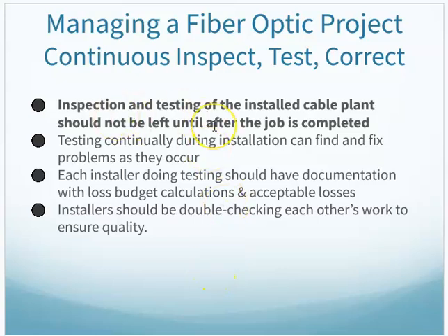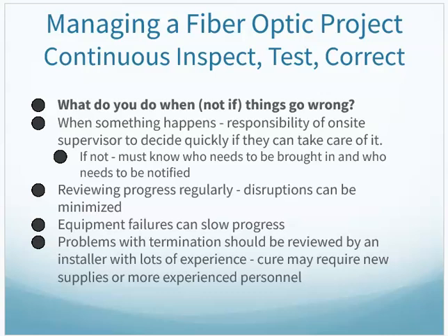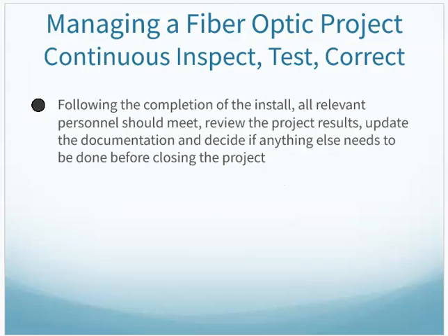Any inspection or testing should not be left till the job is done. Again, some testing might go on as you install certain components and compiling that data. And as things go wrong, who do you need to contact? How do you need to plan? Who do you need to notify? And that's, again, where having the job site manager is helpful.